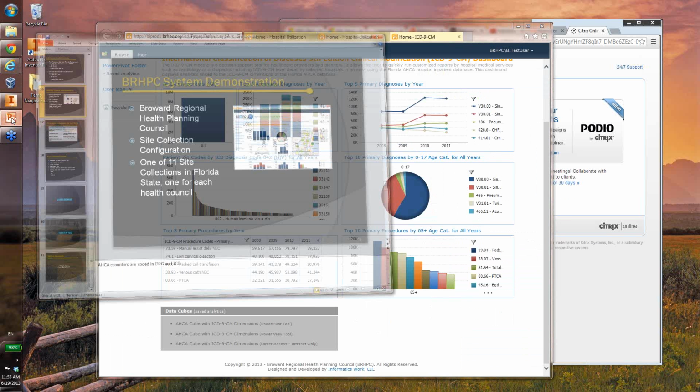You have to limit the scope when you do each project. It's very easy to get lost, and with elastic kinds of projects, people want to add everything in one project, and you end up with an endless project. Just set the scope, do it, and shift anything new to the next project.